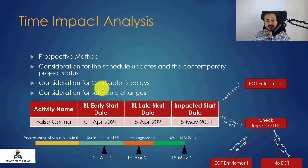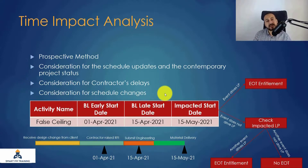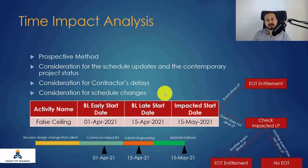TIA also has consideration for schedule changes. In the baseline program of work under the Impacted as Planned method, we typically develop the baseline schedule with many assumptions that may be maintained or changed at a later stage. Normally you have to maintain the logic, remove some relationships, and add others.